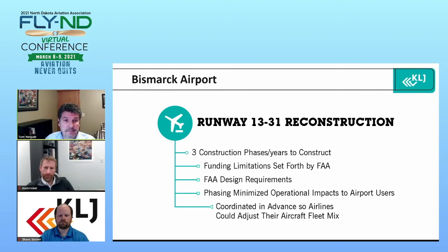And I have to give a shout out and kudos to the Bismarck Airport staff, Greg, Tim, and everybody who worked really hard on this with us and kept the airlines well informed, because airlines switch up. You need to coordinate probably 6 months in advance with airlines with their aircraft fleet mix, so that they're bringing in the appropriate sized aircraft and not something that can't land at the airport. So that was really important when we went through this.